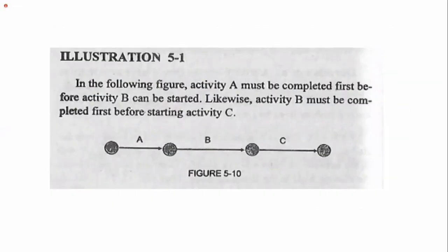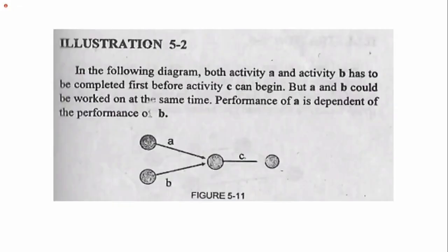So, natin mga illustration for precedence. So, same rin sa katong principles. Following figure, activity A must be completed first before activity B and so on. Dili dapat ma-complete po si B before C. In the following diagram, activity A and activity B has to be completed first before activity C can begin.